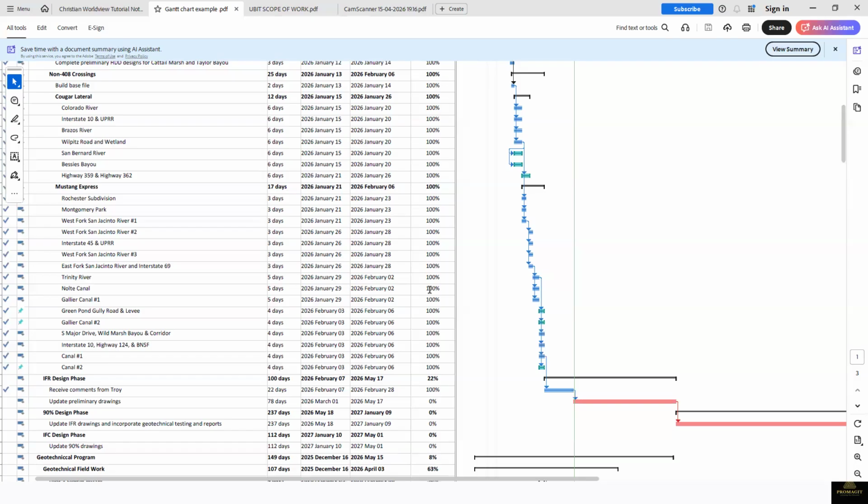So basically, that's what you come to do. You are basing your percent completion. You are checking your end date. You are checking your start date. Usually you don't alter the start date, because the activity that is linked to it, once you update that to when it completes 100%, it automatically affects the start date of the next activity you are moving to do.